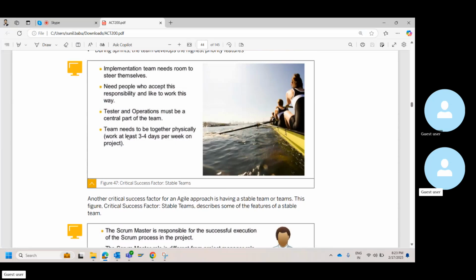And when we are going into the SWT, whatever the customer discussed during the explore phase was not exactly matching. Probably only 50-60% was matching. The rest 40% went out of control. So this person did not know what was discussed by the previous person. So literally you had to redo the 40% of work again, get the requirements, and then do your configuration. That will again lead to a delay for you.